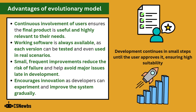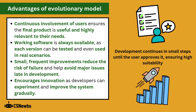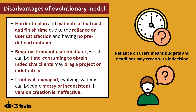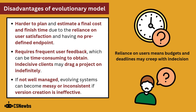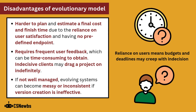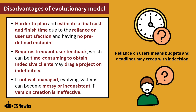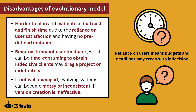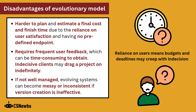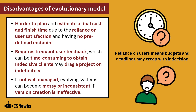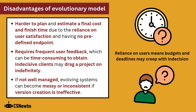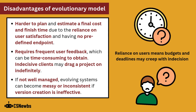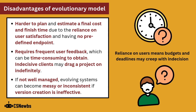It encourages innovation, as developers can experiment and improve the system gradually. However, when using the evolutionary model, it is harder to plan and estimate a final cost and finish time, due to the reliance on user satisfaction and having no predefined endpoint. It also requires frequent user feedback, which can be time consuming to obtain.